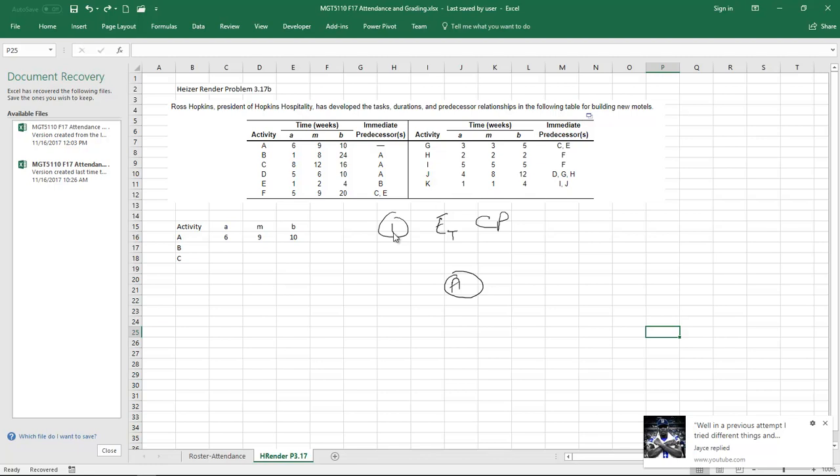Pretty much we're confident that we can get this thing done in 9, but we have reason to believe that it could go as long as 10, which is not too bad. It might go over a week. So pick this problem apart. But on an optimistic note, our optimistic value here is actually 3 weeks earlier. Certain things could align where you might be able to get done in 6 weeks. So there's 3 weeks difference here.